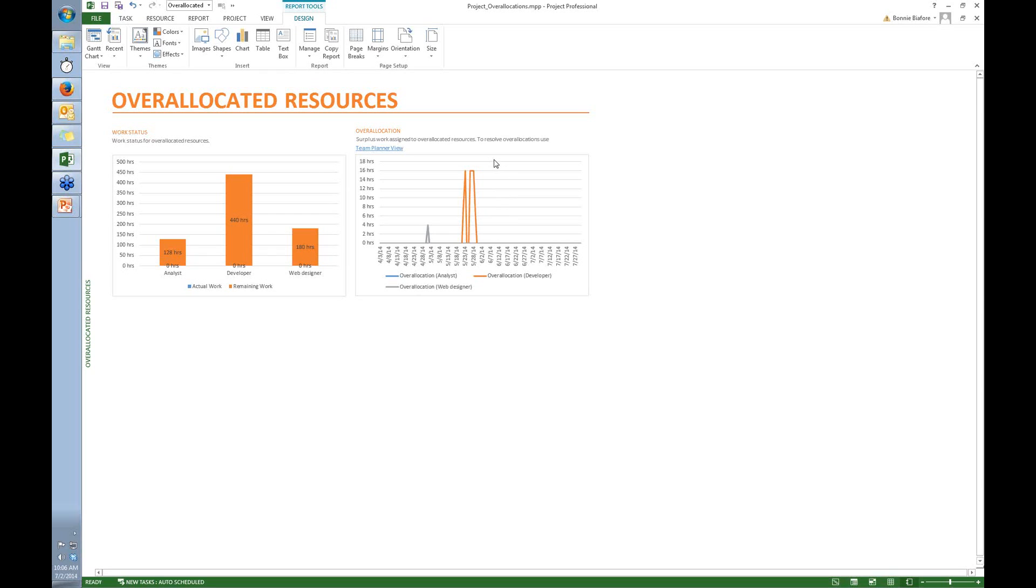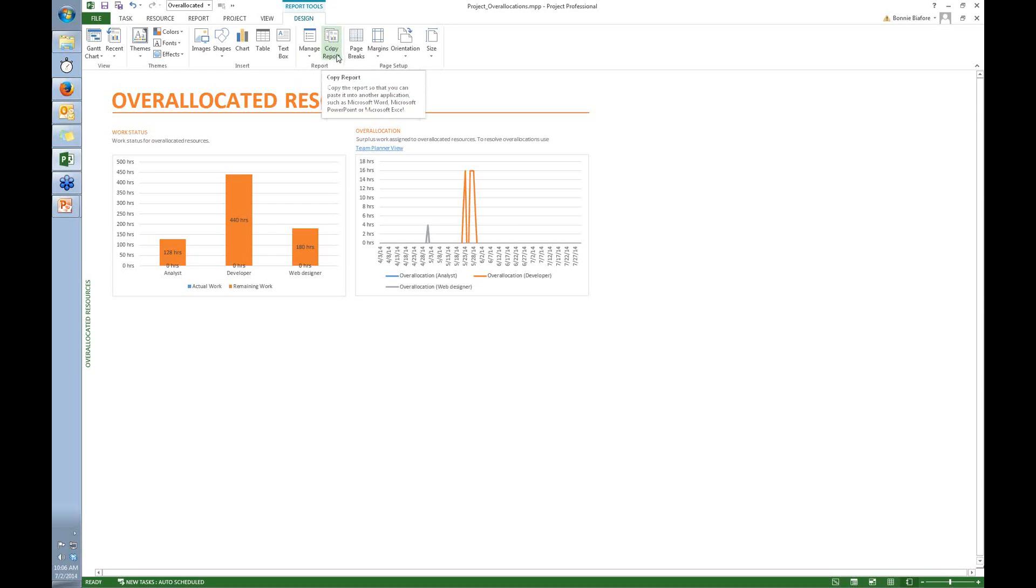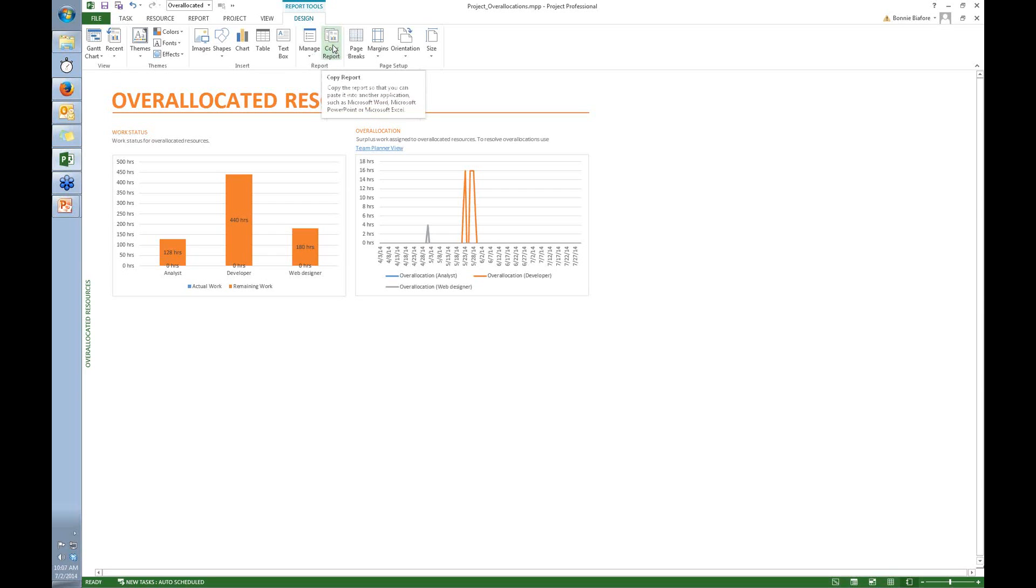So the first thing to do is, because I've got this built-in report, I'm going to create a custom report. Now you see here that it says Copy Report, and you might think that that's how you would copy a report to create a new one. But no, you would be wrong. Copy Report makes a copy of what you see on the screen here, so that you could paste it into something like Microsoft Word or PowerPoint.